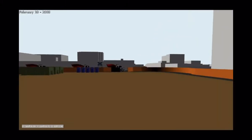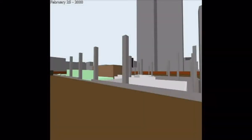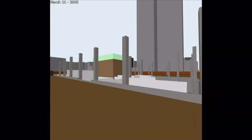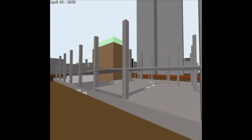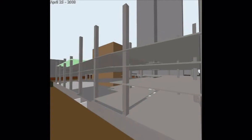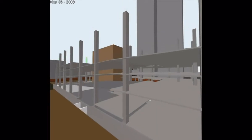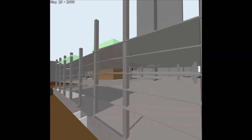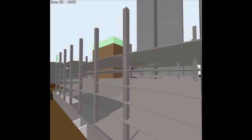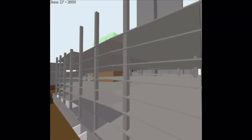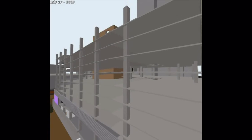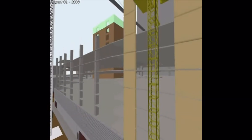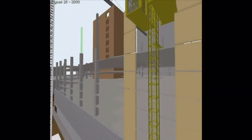What you can do is work with them to take those pieces of paper, take those ideas they have in their head, combine that with the geometry using building information modeling and Navisworks, tie that information to the project schedule, and help them visualize exactly what they're going to be building. They can simulate how that construction process is going to flow, look at all the different options, tweak it as necessary, and keep looking at different simulations. So really, they're building the project multiple times, but doing it digitally using the computer.